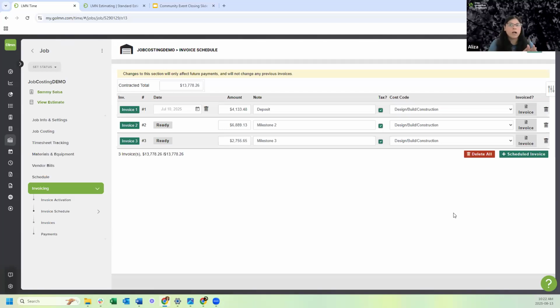That's not efficient, because we want to see our potential revenue in job costing, and we want to see it quickly. We don't want to wait 3 weeks for revenue to populate in the job costing tab. So just one thing to understand is that the second an invoice is created, the revenue populates in job costing. And let me show you how that works.